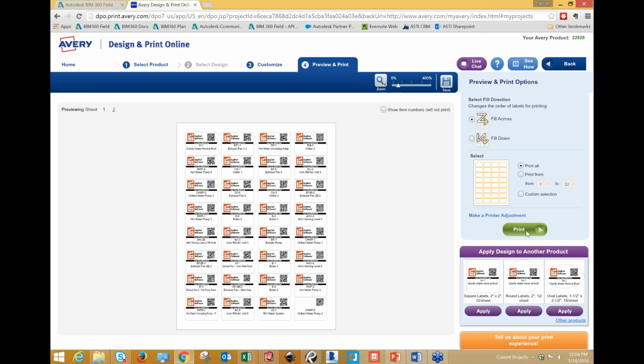So I've seen people track their fire extinguisher inspections with this, VAV boxes, large air handling units. We've also seen, obviously, locations is the biggest one, and that makes the most sense. We have project teams that will maintain these from the time they get their framing up all the way through final completion of the job, to where they literally just put a piece of painter's tape on the wall, stick this over it to make sure that they don't have any problems, and they just run with it all the way till the end of punch list.